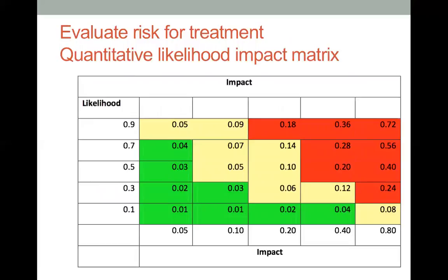Now, if you remember this diagram, let's say if certain risks come to this red zone, then as a project manager, we need to elevate that to the senior management to give them an update, and also to invite them to step in to help us solve the risks. And normally, in terms of procedure, for the ones in the green zone, we will let our normal operating procedure address that.